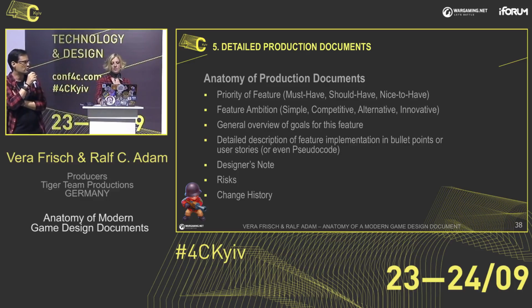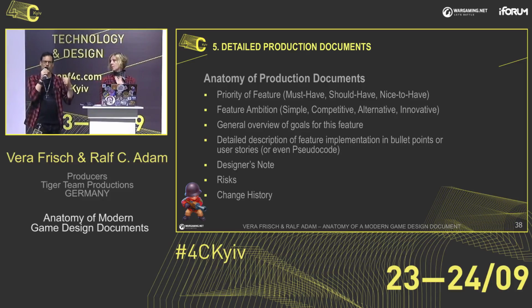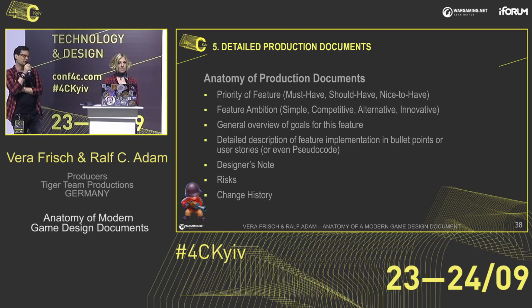And last but not least, what is really important is the change history. This is one of the reasons why you should always document. You design something, you implement it, and it's great. Or you design something, you implement it, it's not working for whatever reason, so you change it. Or the publisher comes up with, I want this additional stuff, or I have a better idea, and you start discussing why it's a good idea or not. You will either come to an agreement that a change is needed and you should change it, put it in there, or you might come to the agreement, well, we talked about this idea, but it's not a good idea for various reasons, and we do not change the feature. Put it in here as well.